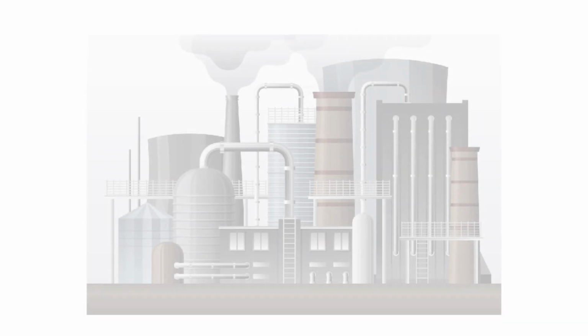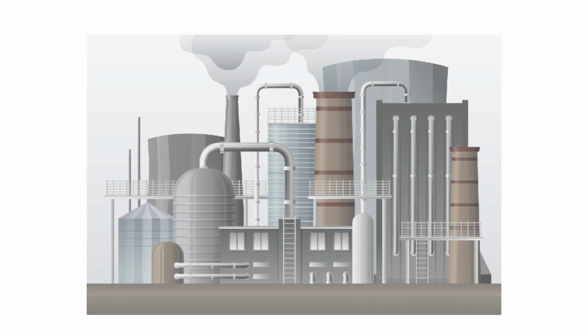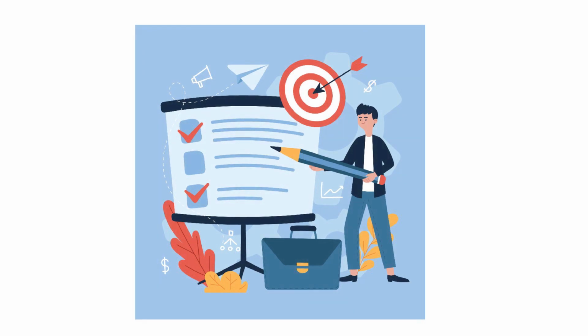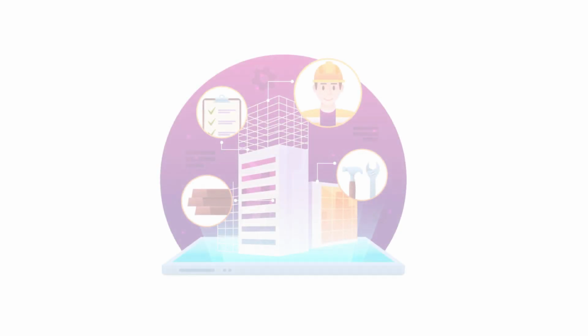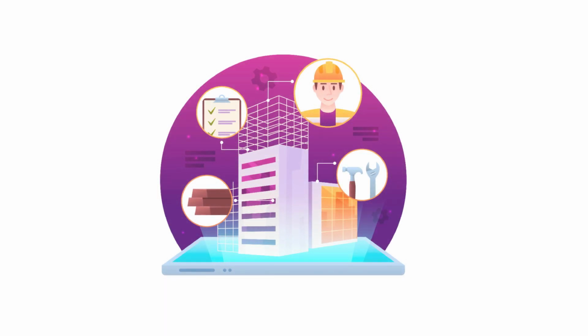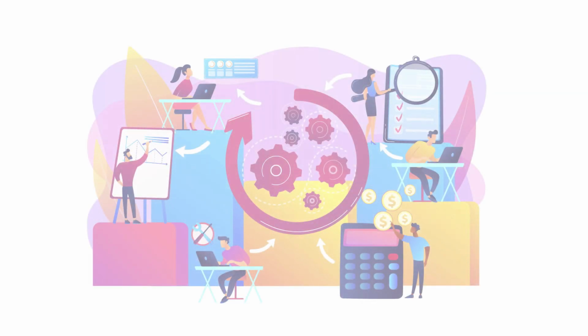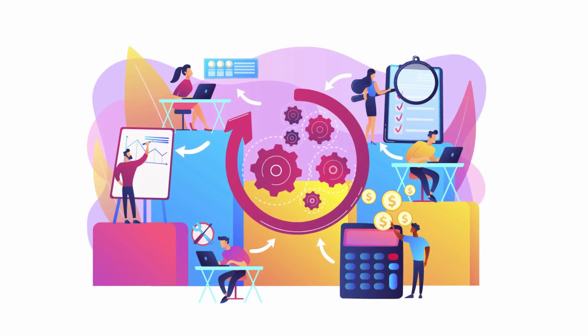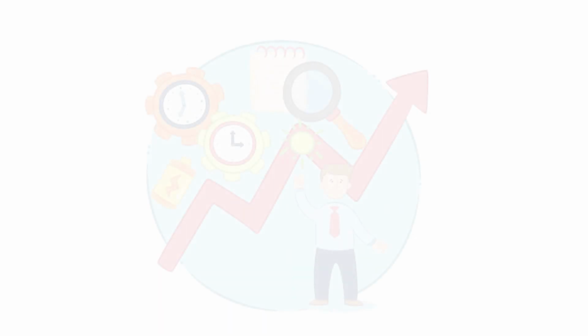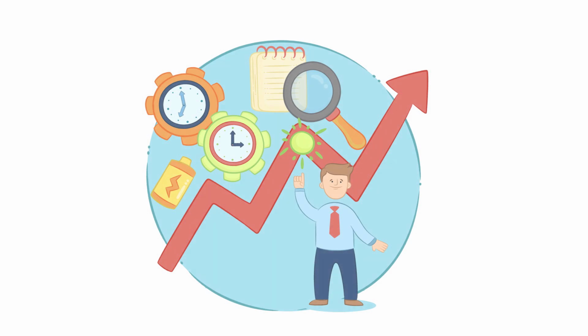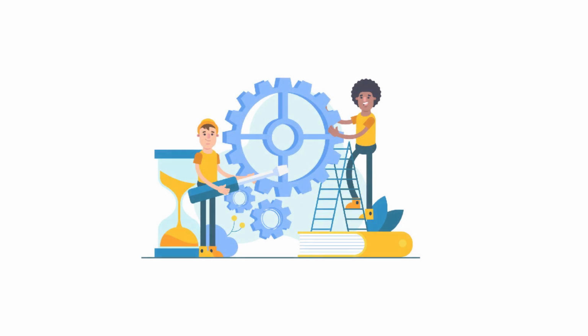In this simple example, bringing a high-capacity batch plant, finding another supplier for silica fume, and improving the concrete strength are under the responsibility of the project team. These actions would not affect the project scope and baselines. However, if the client changes the design or demands to increase the thickness of the concrete, that would be a scope change and the baselines would be updated. In project management, change requests may involve preventive actions, corrective actions, and defect repairs. However, in scope changes, you may update the project scope, baseline schedule, and baseline budget. Preventive actions, corrective actions, and defect repairs should not be used to justify a baseline change.